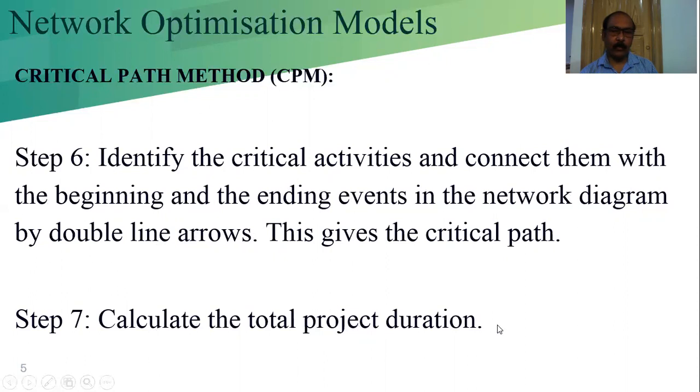Calculate the total project duration from the start to the end event, where the E value and L value are the same; that value is the total project duration. At the end node or the end event, the value of E and L is our project duration value.